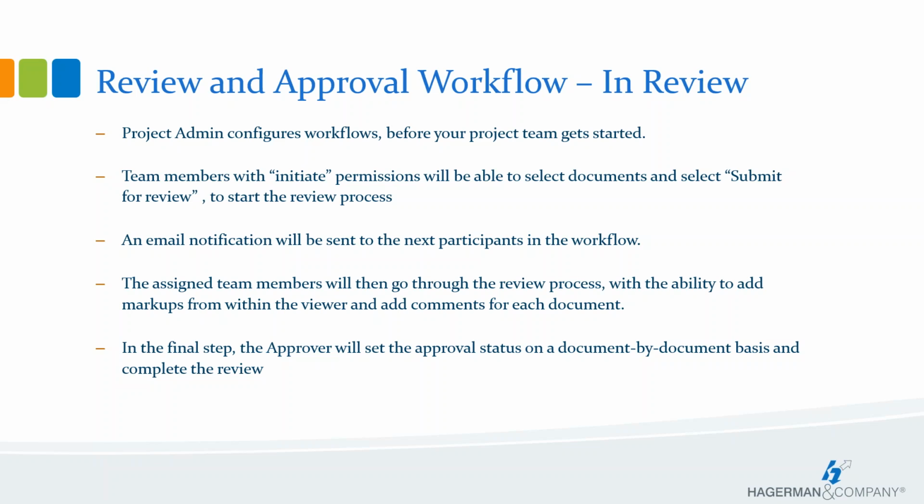Once they're set up, those team members that are designated as initiators in the review workflow templates can select documents and start a new review and approval workflow. The available templates are going to be based on which templates the initiator was assigned to by the project admin. So again, as the project admin creates those templates, they select the individuals that are initiators for that review workflow. They can have multiple templates. You might have some initiators that can start some workflows and some initiators that can use other workflows.